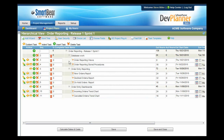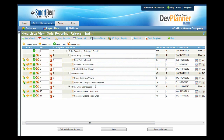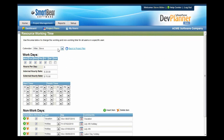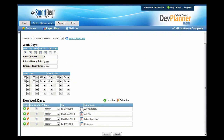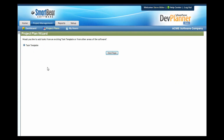If you need to move tasks around, notice the little red arrows here — you can drag a set of tasks anywhere you wish and that will reformat your plan. You can also set working time for each individual, allowing you to set how many hours a day each person works. You can set up a standard calendar for holidays and time off, and then override that calendar for a specific person by adding vacation time. You can also create task templates — a series of commonly used tasks that you can bring onto the plan by pressing the Add Wizard button and choosing Task Template.